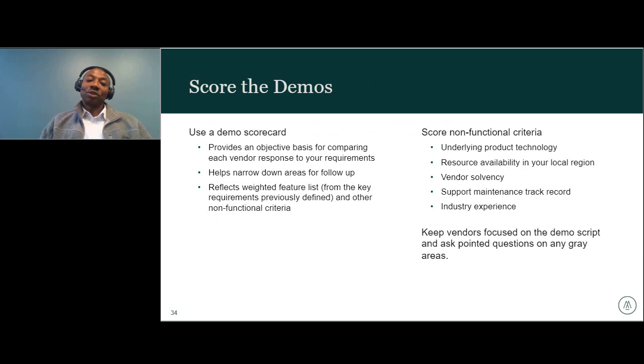And it's also important to put together a demo script and score your demos. When you use a demo scorecard, you provide an objective basis for comparing each vendor's response to your requirements. And it also helps narrow down areas for follow-up and could reflect a weighting of your requirements based on how you perceive the importance of each requirement.